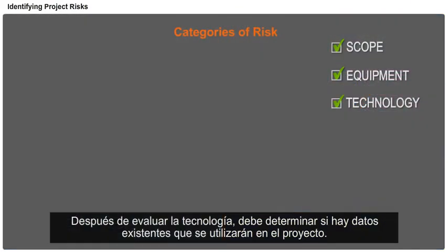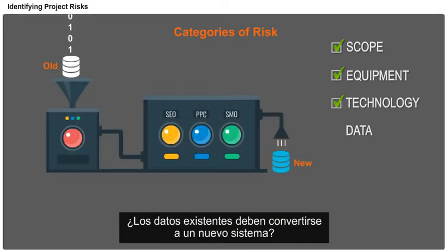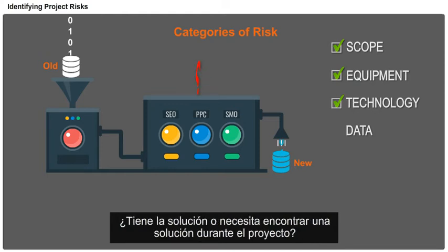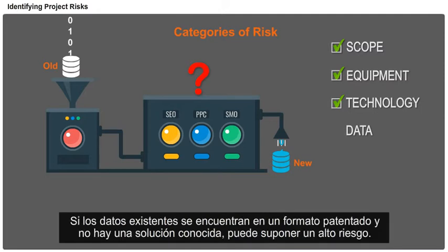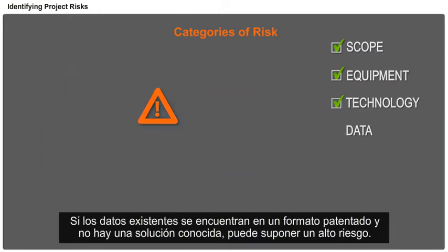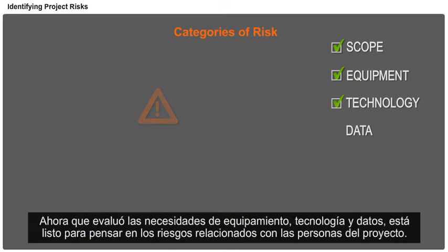After you've assessed the technology, you should determine if there is existing data to be used in the project. Does the existing data need to be converted to a new system? Do you have the solution, or do you need to find a solution during the project? If the existing data is in a proprietary format and there is no known solution, it may pose a high risk.